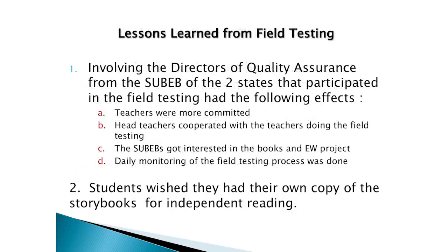Now, these are the lessons we learned from the field testing. We found that the involvement of the directors of quality assurance from the State Universal Basic Education of the two states that participated in our field testing had affected greatly the success of our field testing, because the directors of quality assurance are the bosses of these teachers, and so the fact that these people were at the field test training with the teachers helped to get a full commitment from the teachers that were involved in the field testing.